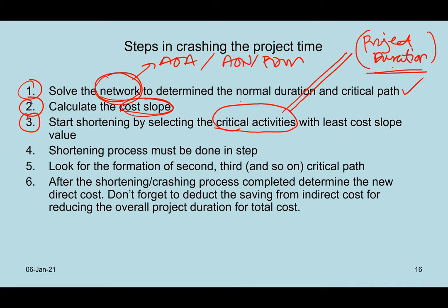So similarly, if you want to compress a project, you need to focus on the critical activities, because the critical activity is the one that determines the project duration. Only compressing the activities on the critical path will reduce the project duration. So now you know, if you compress an activity which is not on the critical path, you are doing something which is basically useless. The project duration is not going to be reduced, but there are already additional costs.